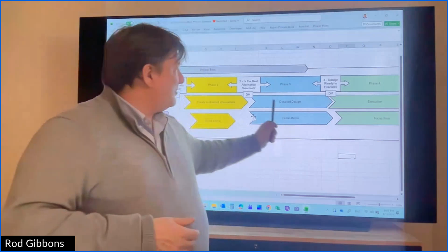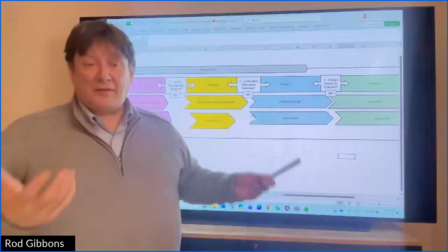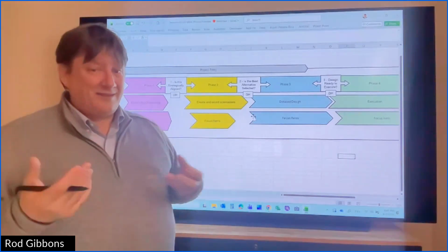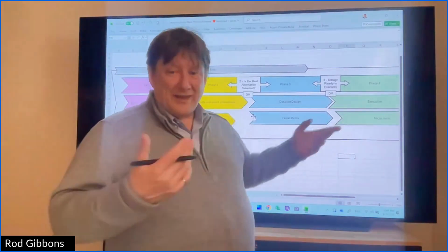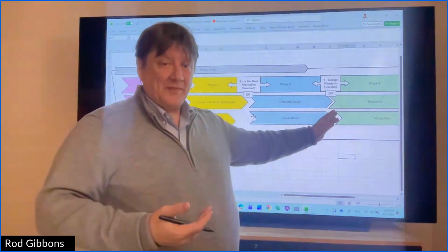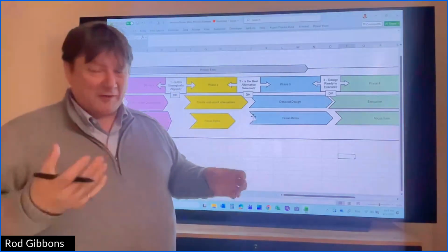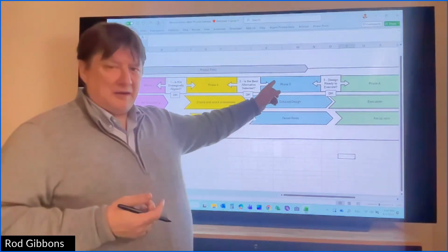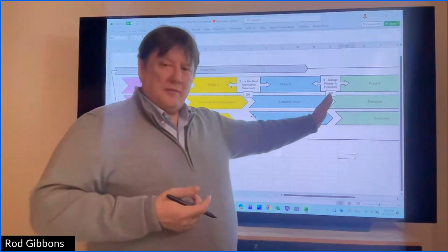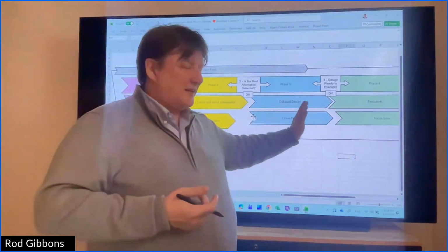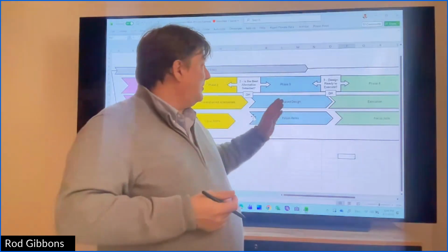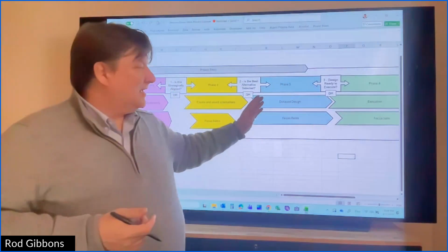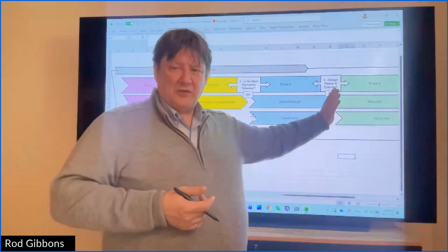A lot of times the issue with that is that a lot of equipment in the oil industry can be long lead items. You make a decision today to do this, you can't get it the next day. So there are different supply chains, different ways of optimizing that. But one of the things that you will see is sometimes there'll be a long lead AFE placed. So even though the project is not completely approved, in order to minimize the time, there is an approval for long leads, so that those orders can be placed and then the equipment can show up when execution is ready.